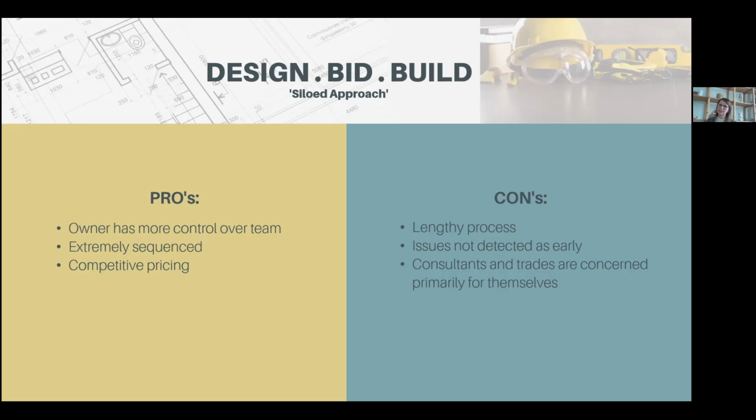As I mentioned with design build, where you've got a cohesive approach, in this case the design is completely done. Then the builder comes in and they might catch things once they're actually reviewing the drawings, but by that time the design is done. And so that means you have to go back and redesign if you decide you want to make selections. It's not happening in the moment as much.